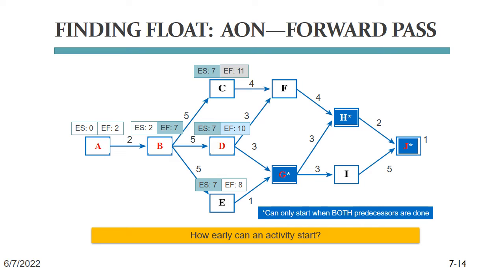Task C takes 4 days, so finishes on day 11. Task D takes 3 days and finishes on day 10, and task E takes only 1 day, so finishes on day 8. So now we need to talk about task G.